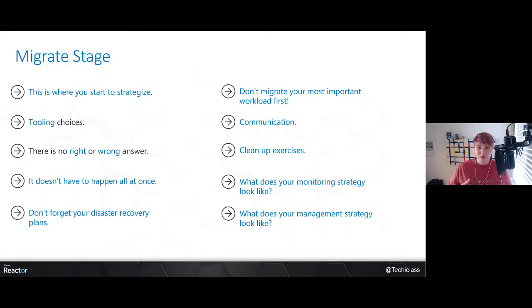Pick something that has a SQL server and maybe a web front end, and then you can learn how you migrate those and you can move them into the cloud. And I say don't pick your most important one, because if something goes wrong while you're on this journey, you definitely don't want your CEO or your boss's boss on the phone shouting at you while you're trying to figure out what's gone wrong. You want to pick an application or a workload that isn't mission critical, so that if something does go wrong during that first migration, no one really notices and you're not under stress to try and fix it.